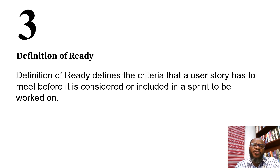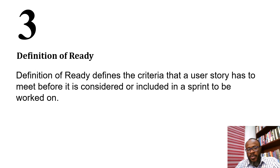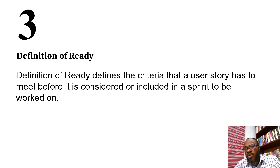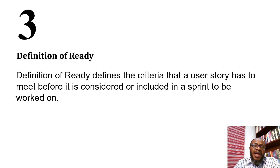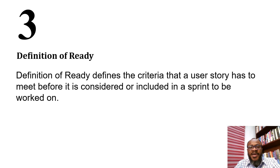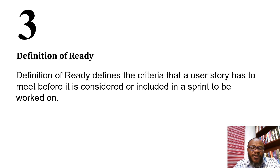The next concept is definition of ready. Definition of ready defines the criteria a user story has to meet before it is included in a sprint to be worked on. When user stories have been created, a number of things must be done before committing them to a sprint — such as refinement, estimation, and value clarification, with stakeholder agreement on the intended goal.